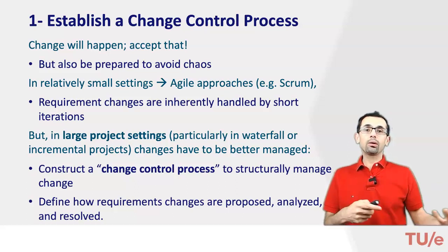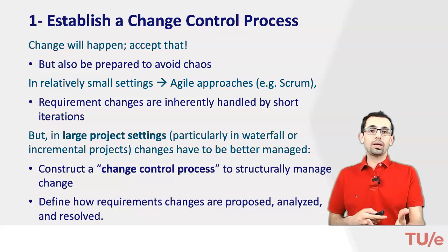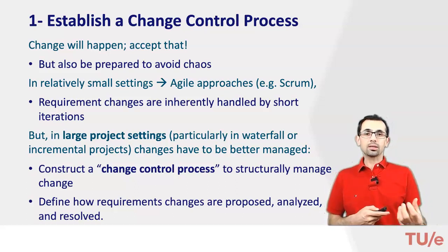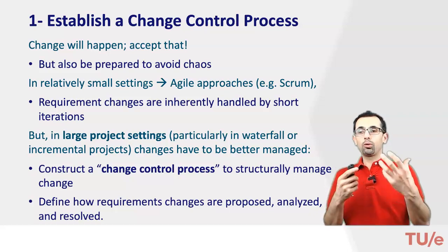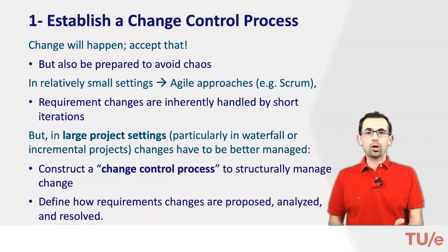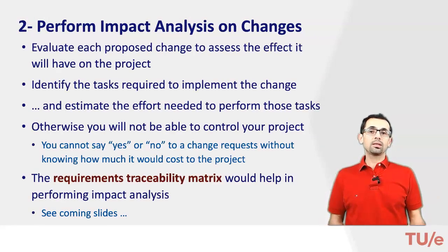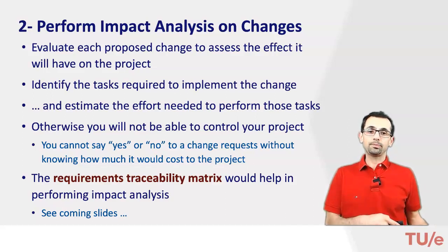In fact, all these good practices are somehow related to this one, establish a change control process. The things that will be mentioned are all parts of this change control process, like performing an impact analysis on changes. Impact analysis is an important element of the change process itself. Here we evaluate each proposed change to assess the effect it will have on the project.